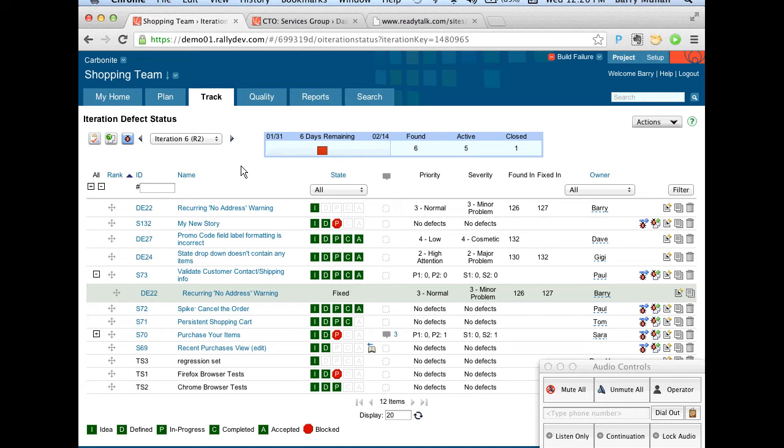Well, think about how you track. In a release, a very common problem is that as the release goes on and you get towards the end, there's an accumulation of defects in the technical debt that needs to be burned down by the end of the sprint. So if you point it and we show a scope change, when you look at your release cumulative flow, you'll see it go like that.